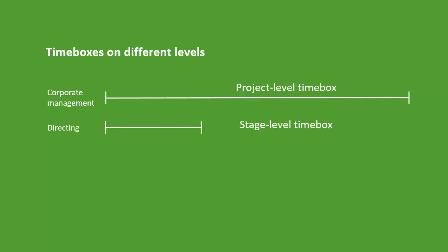And here you want to think cadence, as I said. So you don't want to have to think, oh, first we go with a 3-month stage, and then we take a 5-month stage, and then we take a 1-month stage. That will be confusing and it won't help you. And we're going to work with tolerance on scope and quality anyway. So we're going to fit in what we can fit in the stages. So for the stages, you go with cadence. So a 12-month project, for instance, could be cut up into 3-month stages. An 18-month project, 3-month stages, maybe 6-month stages, but find a cadence that works for you. And you don't want it to be too long.